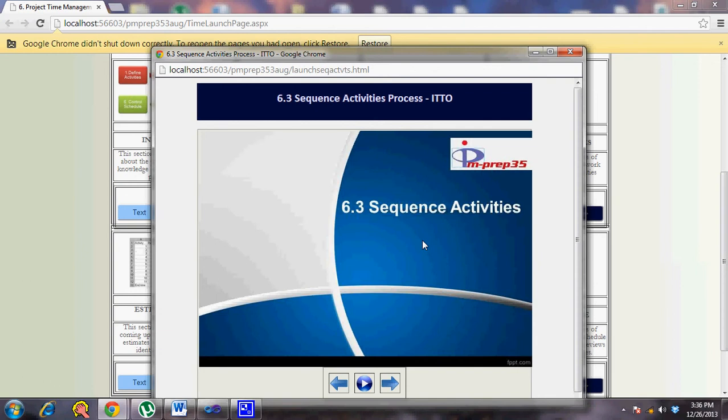The WBS or the scope baseline, which involves the scope statement, WBS and WBS dictionary, is a key input for this process. Specifically the scope statement is specified here because the WBS is more of a hierarchical or diagrammatic representation. So you use the scope statement as one of the vital inputs of this process, because until your schedule is baselined with the project schedule, you have to keep in mind what the scope is and what the scope baseline is.